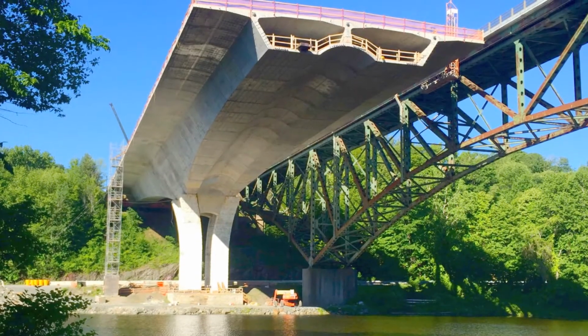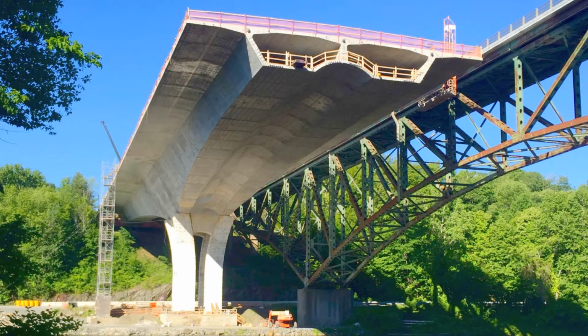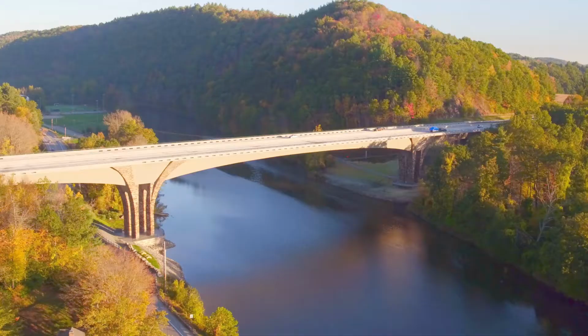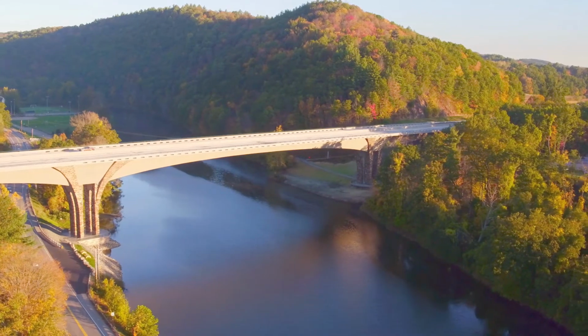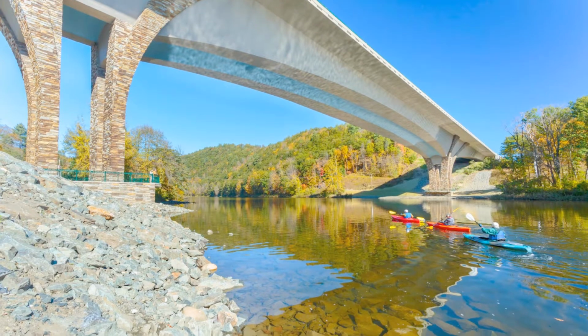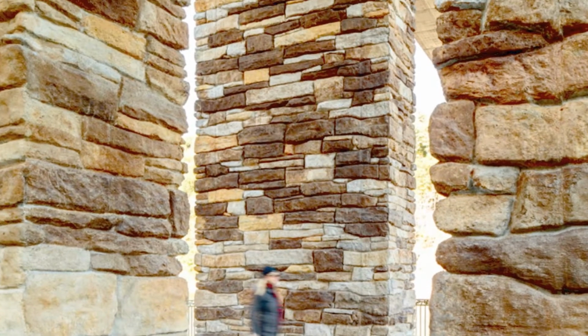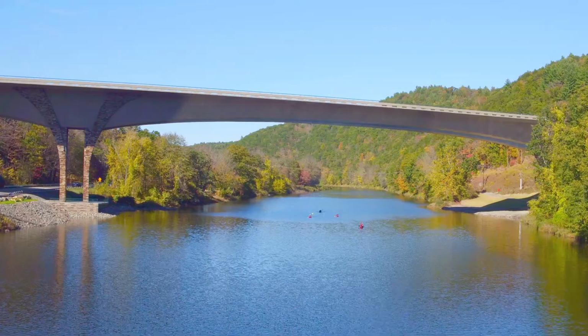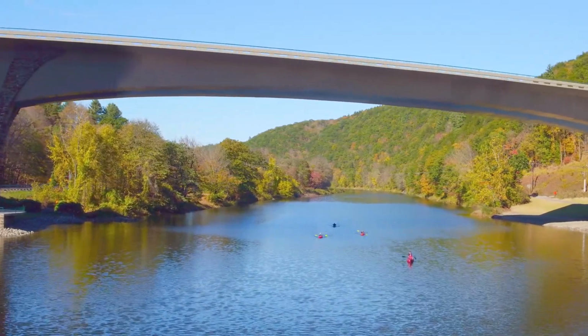The quad wall piers also provided proper stability during the balanced cantilever construction of the main span superstructure, which allowed the bridge to be built over the West River and State Route 30 without the need for temporary props in the river or roadway. This provided uninterrupted use of the river and roadway during construction. Visitors can walk between the massive 70-foot tall stone textured columns, which are both functional and structural works of engineering and art.